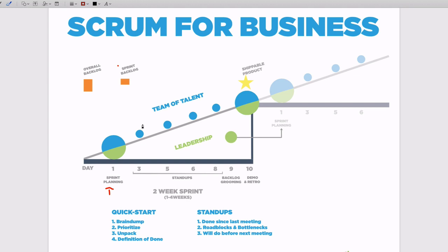So I think to be mindful of is if you've got more than 9 people on your team, you'd want to break it into multiple teams, or else the morning stand-ups start getting messy. Some of the backlog grooming work gets messy, and you can really start losing a bunch of time. So in these morning stand-ups, you can see they're just little circles. So they're like probably less than 10 minutes, even possibly less than 5 minutes. And the stand-up format is right here.